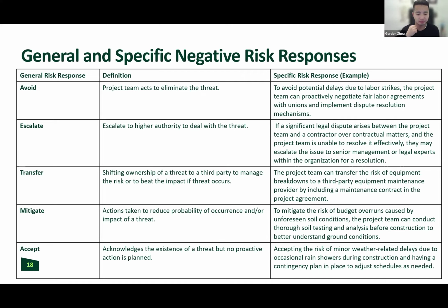And I say, you know what? I'm going to avoid that risk. My specific response would basically be, if I'm going to avoid or eliminate that risk, I'm not going to send a person up there at all. I'm just going to send a drone up there instead. Basically, what I've done is eliminate that risk entirely through that specific action.